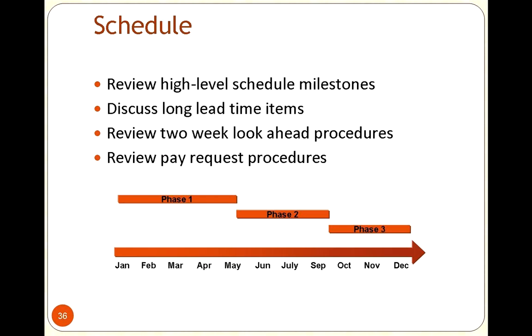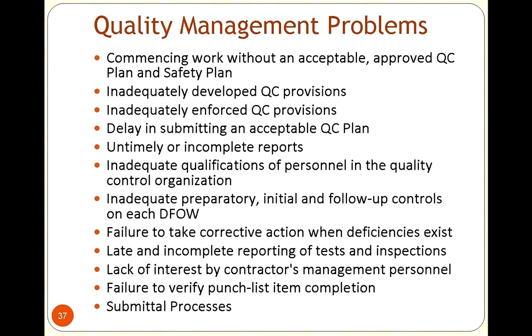And then we also said that's going to affect whether or not we're going to cut them a check, if we were paying them in phases, knowing that we probably had to be financially ready for that, and that we're going to have to start any accounting processes. That helped us with that 2-week look ahead as well, and it helped grease the wheels in making sure that the bus ran a little bit faster.